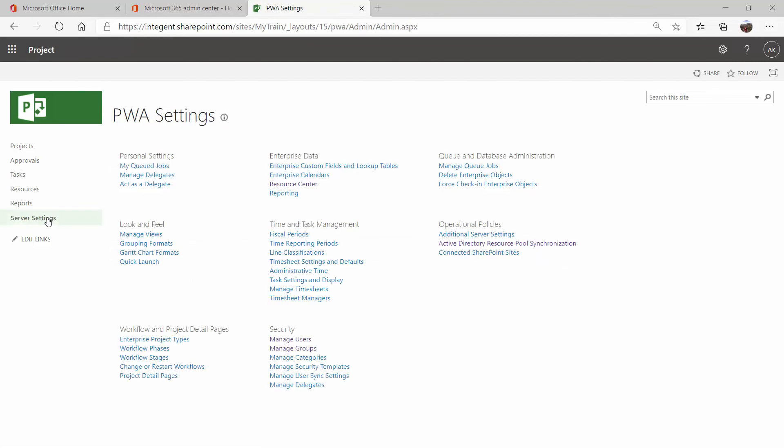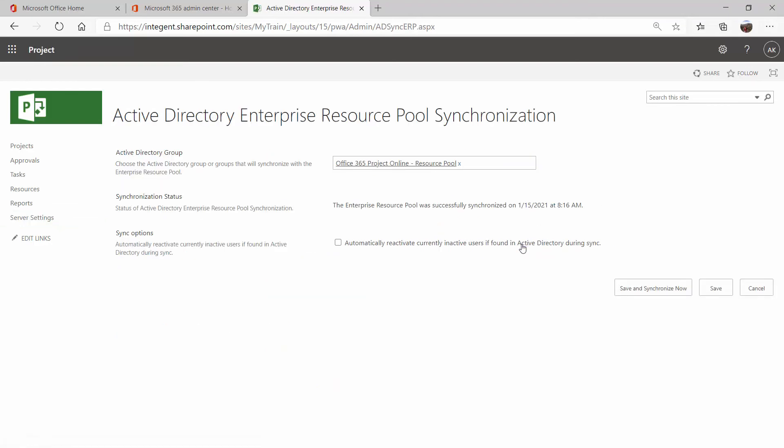Now, if you do have your Active Directory groups embedded, then when you did add a user to that project manager group, and I have my resource pool synchronization in place, they will also be added to the resource pool. So I can add them to tasks if I'm building a project plan and they need to assign tasks to the appropriate person. So there is a separate place on the back end for synchronizing your resource pool. Your Active Directory resource pool synchronization here, and you can see all of the options here, which there are not very many, are entirely related to syncing the resource pool.